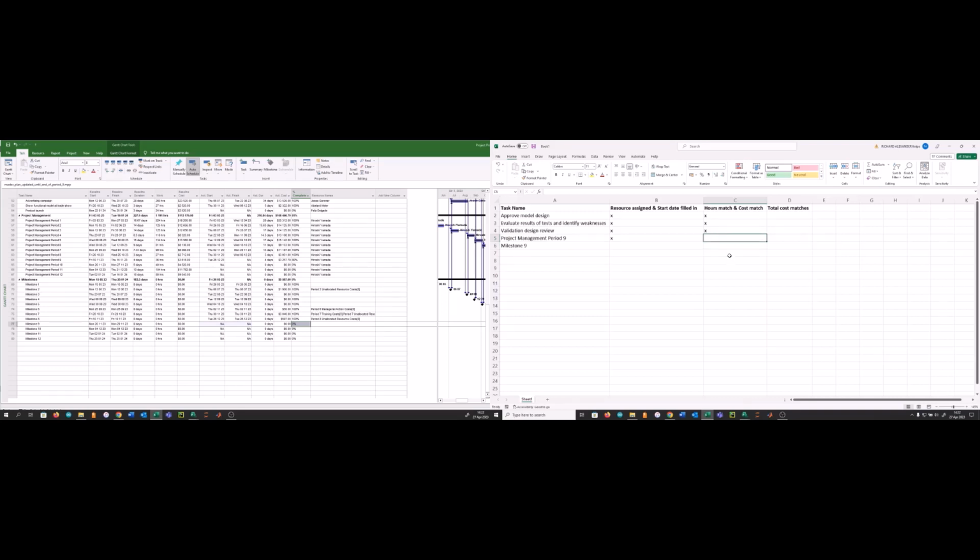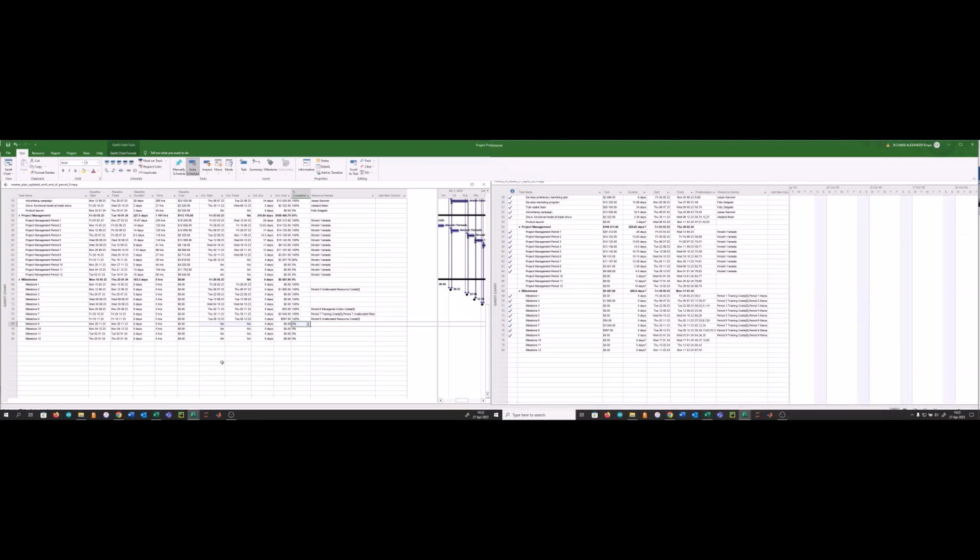the project management. Now, something else about the milestones, you'll see over here that if you want to assign the resources, you literally just assign the unallocated resource costs and so on, which is pretty straightforward. You just set this to 100%, and the start date over here is coincidentally the same as well. So with the milestones, since they have a 0 duration, they don't actually have any logs in the task usage view. So you don't need to change anything there. I'm just going to save everything now.